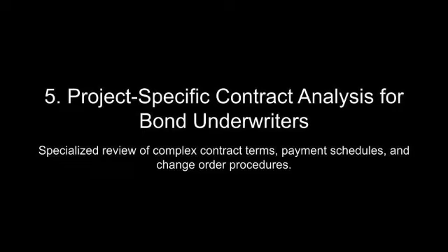Scope changes introduced through change orders have a direct and profound impact on bond risk exposure. Every modification to the original contract introduces new variables that can destabilize the delicate balance between project resources, contractor capabilities, and project owner expectations. For instance, a significant expansion of project scope may exceed the contractor's operational or financial capacity, leading to delays, quality issues, or outright default.